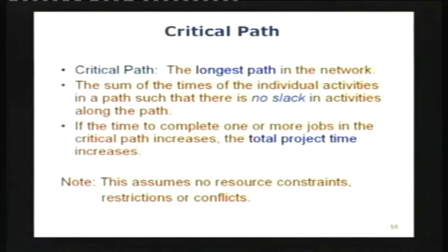Slacks are very handy in terms of reallocating resources. If a particular task has a lot of slack, probably you can spare those people and they can go out and help on a task that's on the critical path. This way you end up keeping everything up to speed pretty well, and you make the best use of resources at your disposal. The total project time, of course, is the goal. That's what we want to reach.